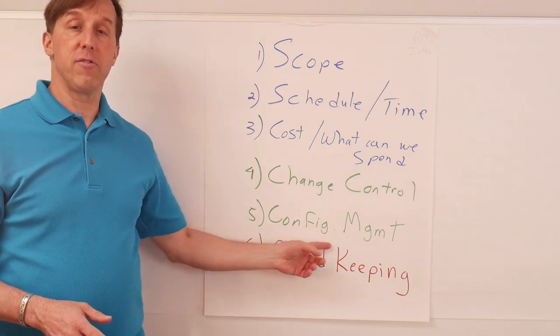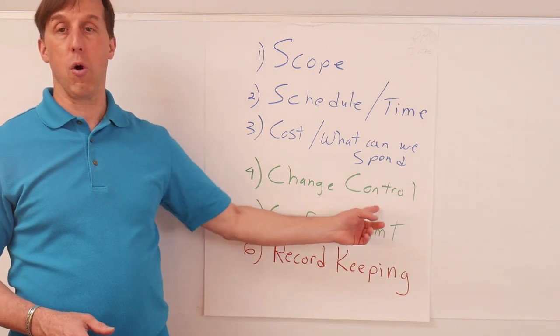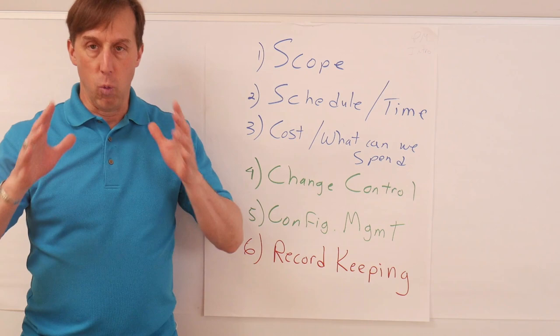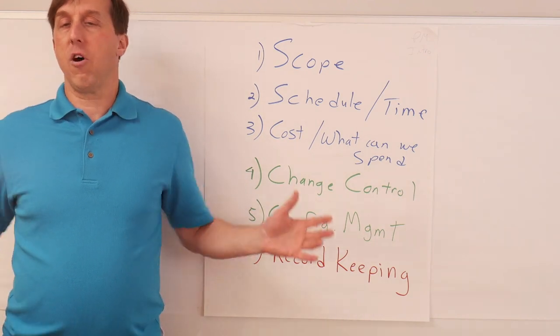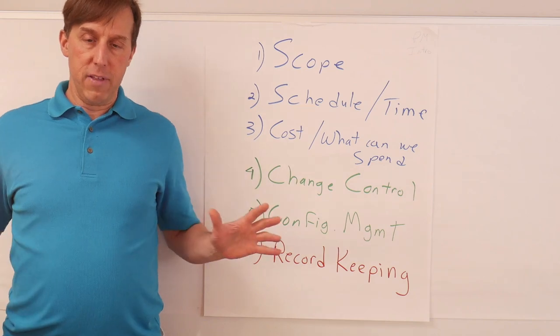Now, configuration management underlays the system that lets you do change control in the first place. So you have one drawing, that's the master drawing, the latest version. All the other drawings are draft. Okay, if you don't have that, if your master copy is on someone's computer or someone's portable drive, and maybe they take it home, maybe they don't.